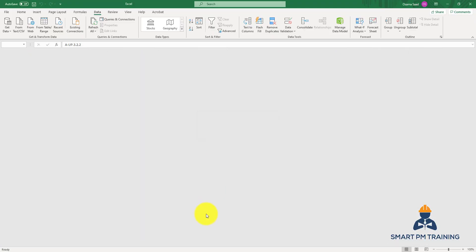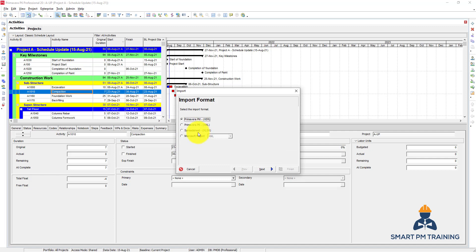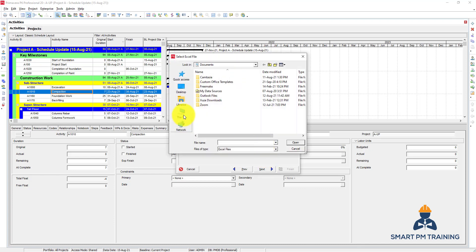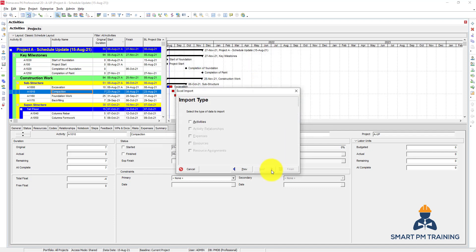Click Close and Save. To import, go to File > Import. You can import the Primavera XER file — it is like a backup file you can use later on. In our case we will import a Spreadsheet. Click Next, choose the file, click Next, and Primavera detects the Primavera codes in the first row. It recognizes the 'Task' sheet and knows it is related to Activities.